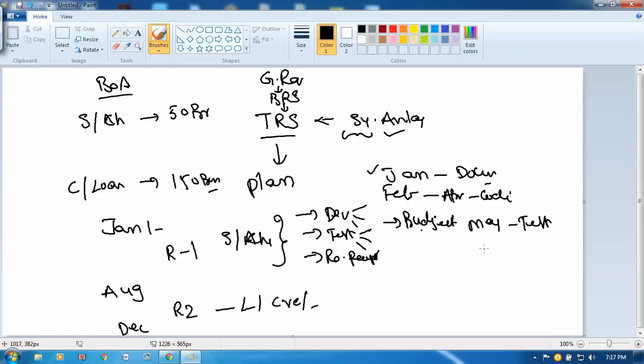As a tester, I'm going to report some bugs, right? They are going to fix it. Again, I have to conduct retest. So June for retesting and July for user acceptance testing. Then in the month of August, we are going to deploy the code in the client environment, meaning we are releasing the product. We are planning like this.